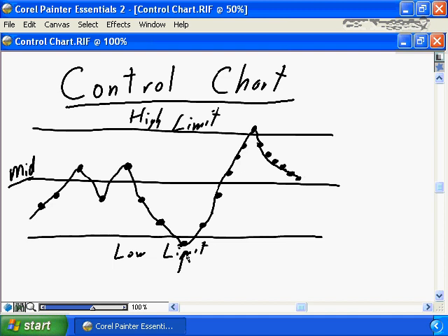We've done a measurement, and it's below the lower limit. So we have to take corrective action on behalf of the project to correct the problem. And we see our corrective action is improving it, but all of a sudden it's improving it to the point that we have now exceeded the high limit. So again, more corrective action needs to be taken to ensure that the process is reversed and that we go back and start to trend back to the midpoint.